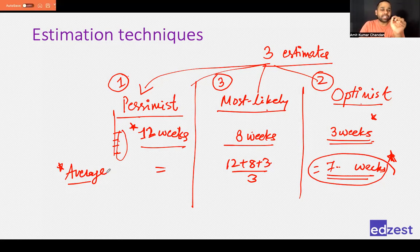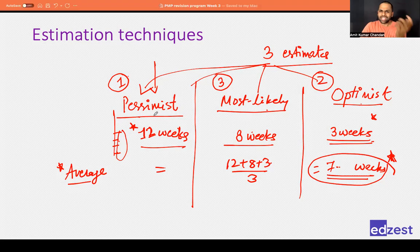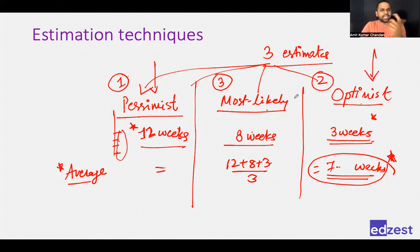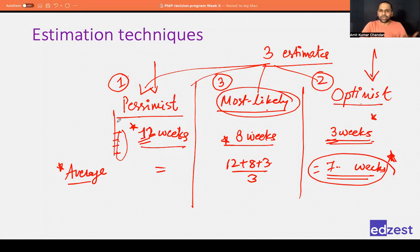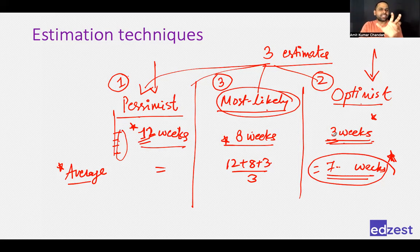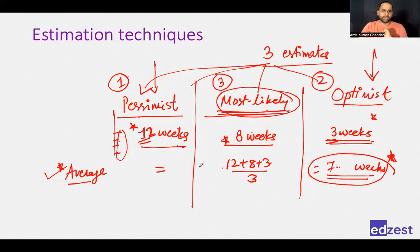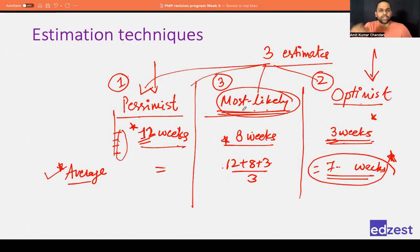However, the probability that everything will go wrong is less, and the probability that everything will go right is also less. The chances of finishing close to 8 weeks is much greater than 12 weeks or 3 weeks, because in any project, not everything goes wrong and not everything goes right. So why are we giving the same weightage when taking the average?